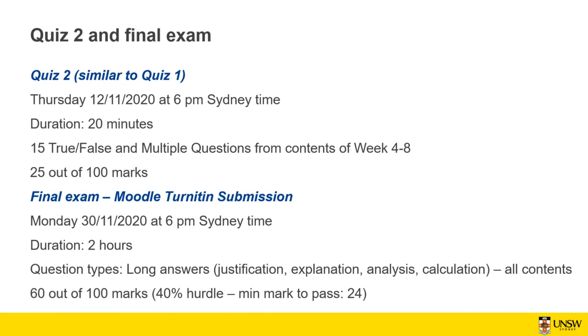That's right. But you don't need to calculate EV as BAC multiplied by percentage of completion. BAC is just the budget at completion, so it can be equal to the PV when you're assessing at the completion, or the supposed completion, of the project.